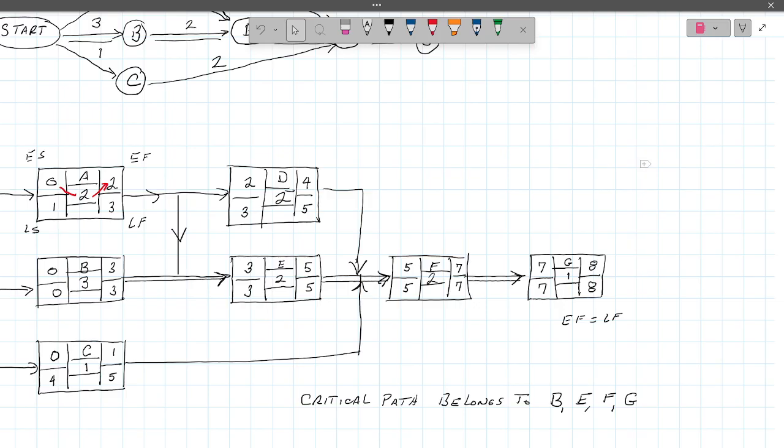I think what you're asking, Gabe, is are all jobs going to be the most critical things? No, it really comes down to what's going to be your critical path is the one that takes the most amount of time. So is pouring concrete a critical activity? Yes, to make the rest of the building go up. But it's not always parts of it that are going to be critical. It could be, well, that's not so critical. We got a couple weeks to play with because in order to get to the second pour, we need to do something else before we can do that. Okay. And that has some wiggle room in it before we go do anything.